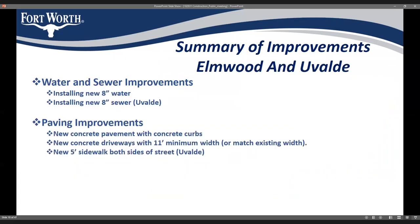For Elmwood and Uvalde, we'll be installing a new water line in both streets, a new sewer line, and paving improvements. We're coming through with new concrete pavement with integrated concrete curbs and new driveways. For all driveways on the project, they'll be at least 11 feet wide — that's our minimum width — or we'll match your existing driveway width. Both streets will have sidewalks on both sides.